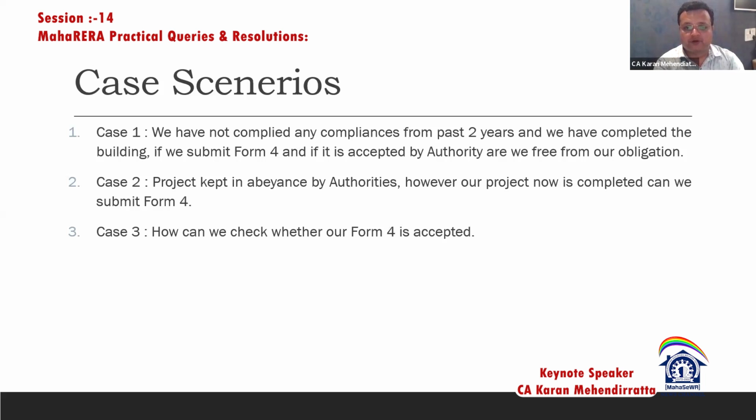First, you have to make sure that all the statutory compliances are done by the promoter, and the project is live again on the MahaSeWA web page. Then you can submit the form 4, and you can get the form 4 acceptance mail.